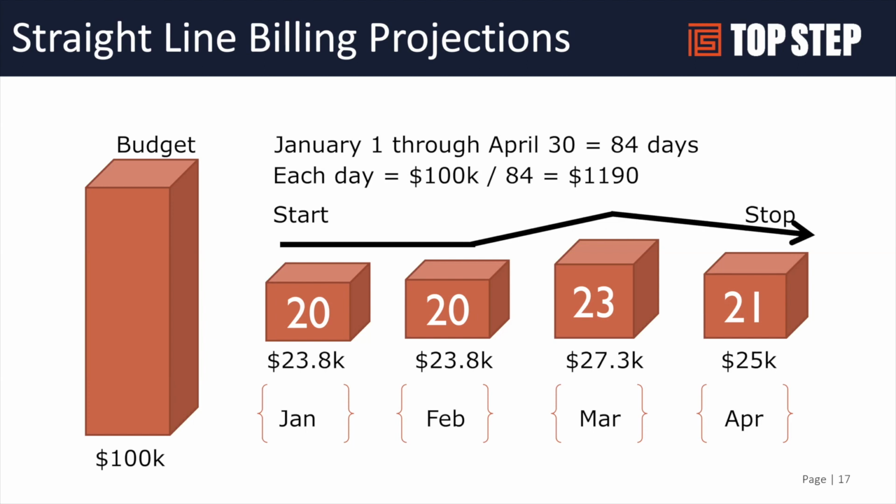And the other thing I've seen with straight line that we've done for other customers is if you are connected to a CRM, for example, and let's say you're bringing over anything at 80% probability, we can bring those 80% in as part of the setup of the project, and then we can apply that 80% to the straight line projections for those projects. So you can actually use the probability of the opportunity to factor down the projections, so you get a little bit more accurate pipeline forecasting capabilities.